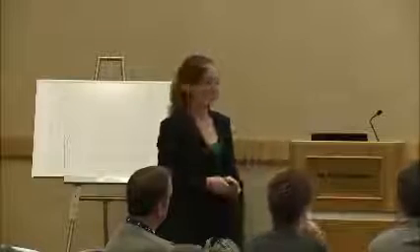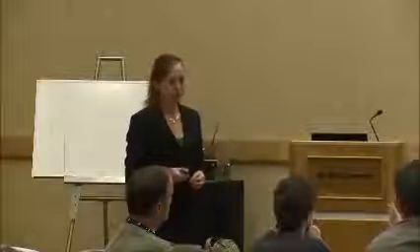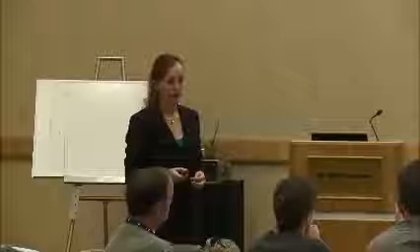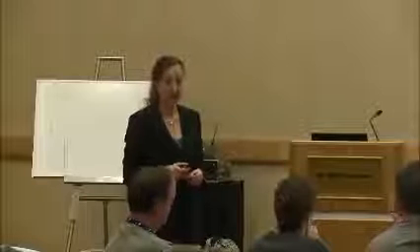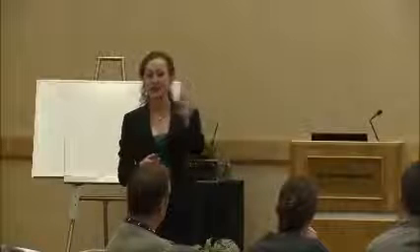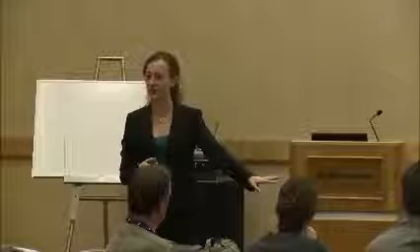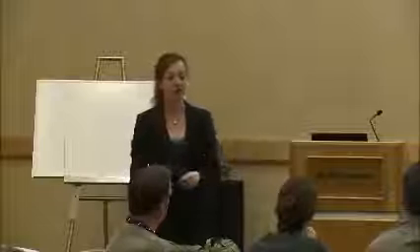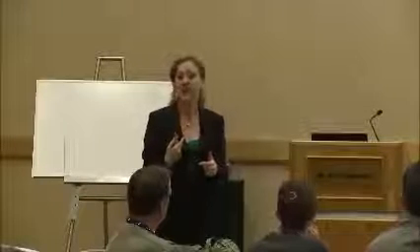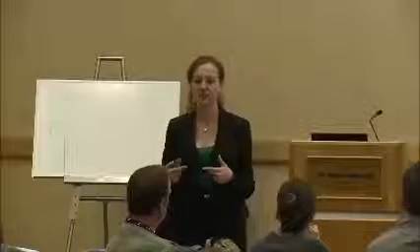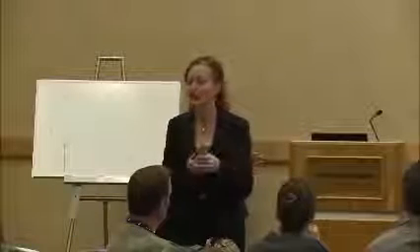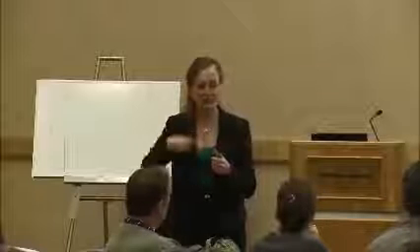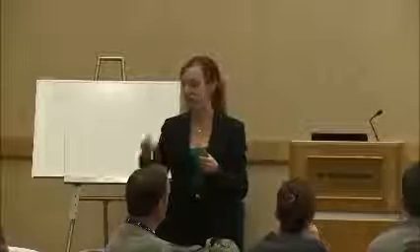So when you did the first part and then you went to the second part to see noticeable change, were you able then to review it and fine-tune it and get more change again? Yeah, absolutely. And when you go back and reassess, there'll be new risks, and there'll be some that will just drop off the list because they're not relevant anymore or the context has shifted. And then you just need to ask yourself, how often do you reassess? Because sometimes you might do it on a 6-monthly or a 12-monthly basis and actually you don't see a shift. It all comes down to your pace of implementation as well.